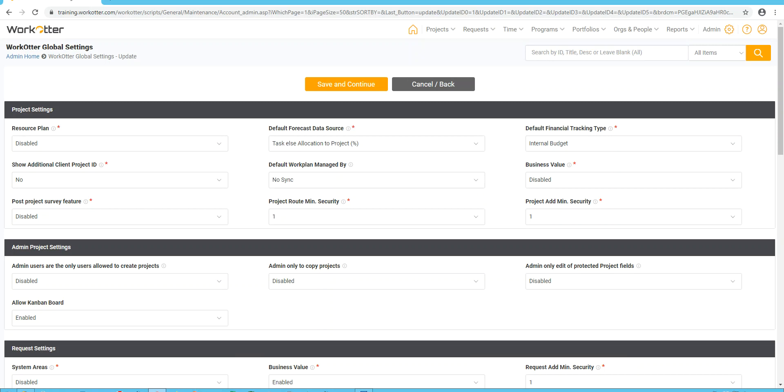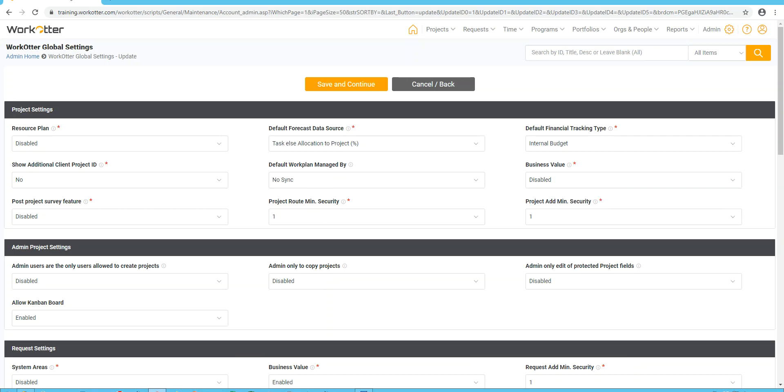Now, on the project side, when you create a project, there's a scorecard, a business value assessment, if you will, that you can enter after you've entered the initial project charter type information on the project form. Some of our clients really love this feature and want to be able to score every project. And those clients would set this up or enable it. Others, or if you're not sure, I would recommend just leaving it disabled. Similarly, there's a scorecard that you can engage in at the end of the project. So you can literally tag people on the project team, usually stakeholders or senior level people, who you want to collect survey information from this project. How well did we perform on this project? And so you can enable that. We recommend leaving it disabled for phase one. That's not typically part of a phase one implementation.